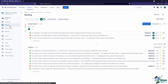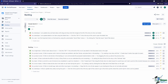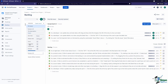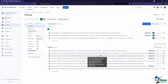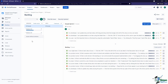When we're ready to plan the next sprint, we hop into the backlog and can see the three incomplete issues have automatically been added to the next sprint. We can filter by team member to review each person's issues. We can also see versions — for example, version 2.0 has seven issues total with two complete and some still in the sprint or backlog. We can do the same for epics — currently no issues in epics, but we'll look at those more when we work with roadmaps. It's the same grouping concept as versions.